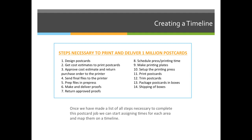The printer will make and deliver proofs. I'll sign off on the proofs and return them. They'll go into scheduling to choose a time for us to print, then make printing plates, set up the press, and finally print our postcards. Then they'll trim the postcards, put them in boxes, and ship them. Once I have a list of all the things necessary, we can start visualizing that on a timeline.